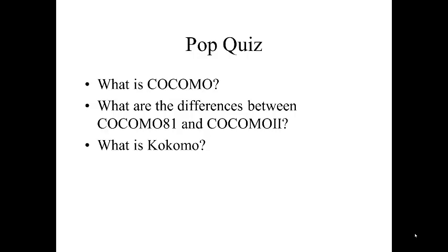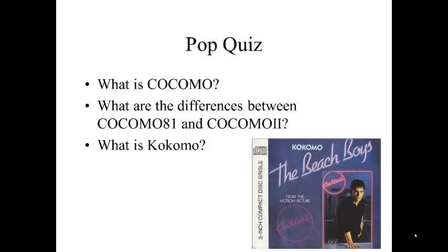COCOMO 81 is the original COCOMO model, and COCOMO 2 is the updated model that takes into account new types of system development such as object-oriented programming, component-based systems, COTS, and glue code. It also takes into account database-intensive systems not discussed in COCOMO 81. COCOMO with a K is actually a song by the Beach Boys from 1988, so the song is in fact named after the software engineering model.